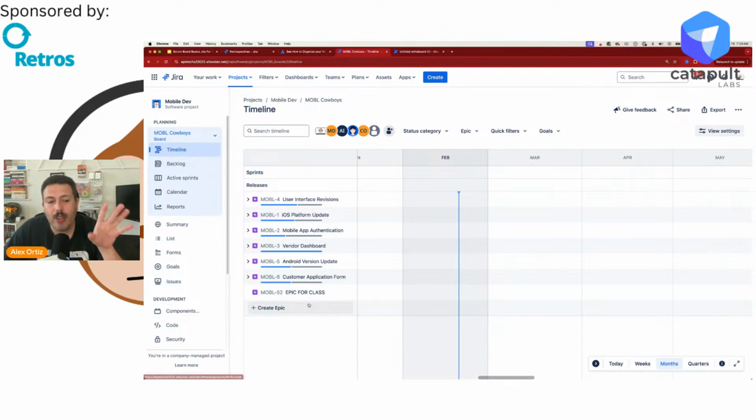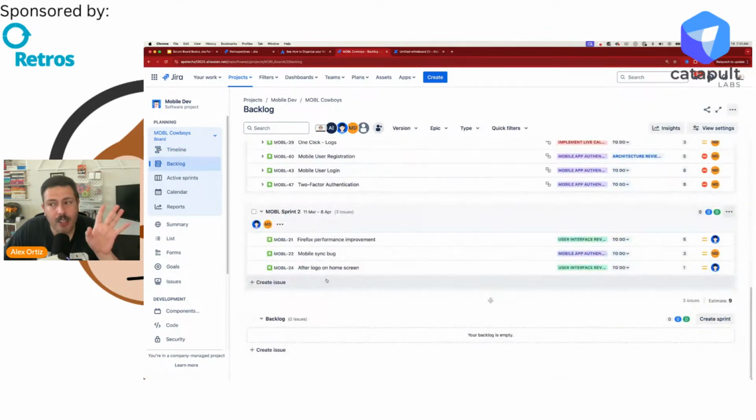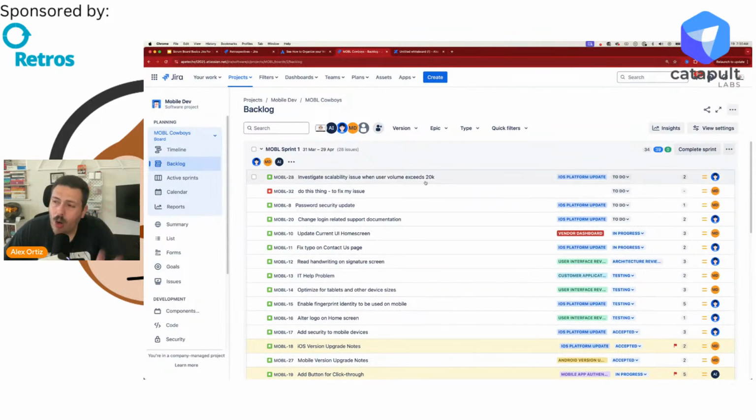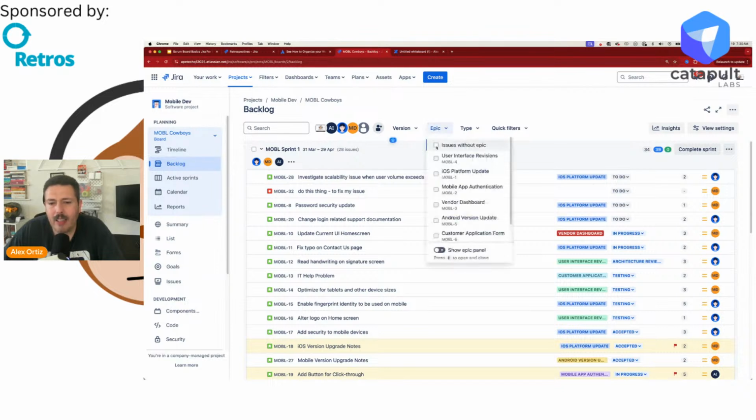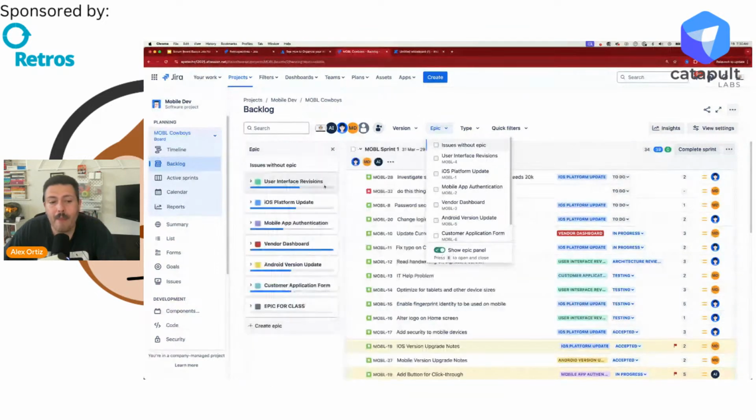All right. So when you create your epics, they will not be visible. So keep that in mind. If you try to find your epic in the backlog, you're going to be searching for a really, really long time because they're not there. However, not all hope is lost. You do get to see the epic up here. There's an epic panel, and you can show it. You can slide the slider and you will see a panel with your epics.